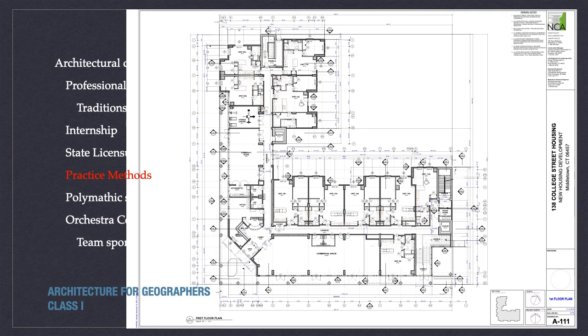For example, there could be an undocumented buried oil tank that has to be removed as hazardous waste, or some equipment that was selected is no longer available by the time the project is being built, or there's a strike, or new public regulations come into effect that you can't be grandfathered in for. Consequently, the contract documents are highly detailed.